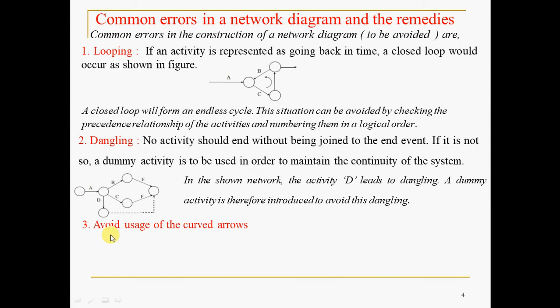Apart from this, you should avoid the usage of curved arrows as discussed earlier. The arrow should not cross each other. One arrow should not cross the other arrow. Use the inclined arrows. Fine.